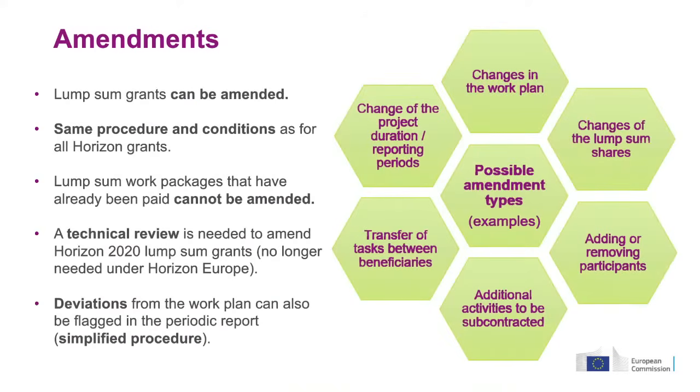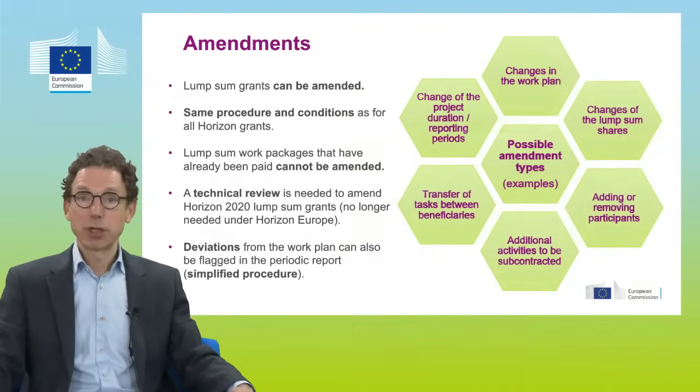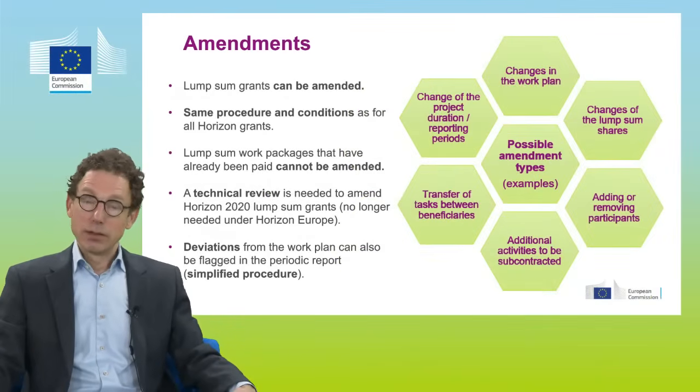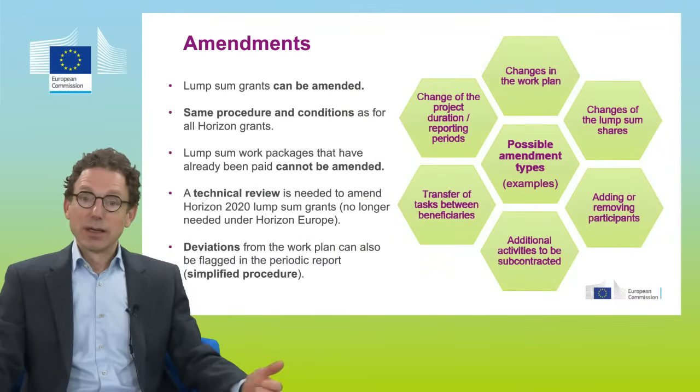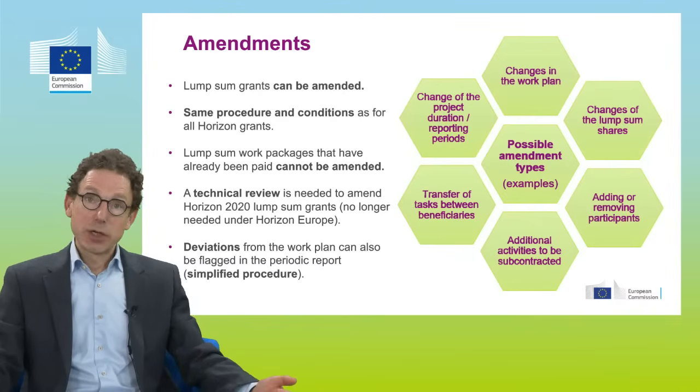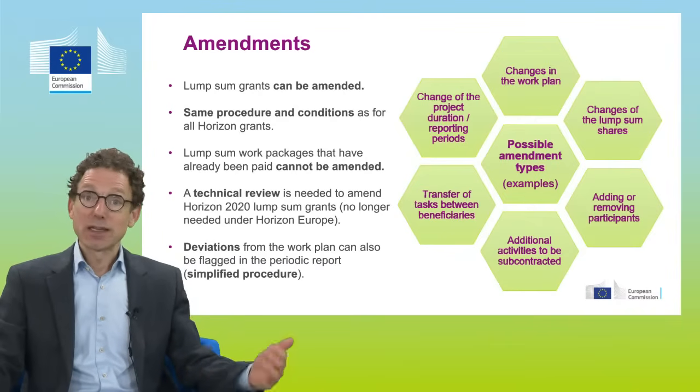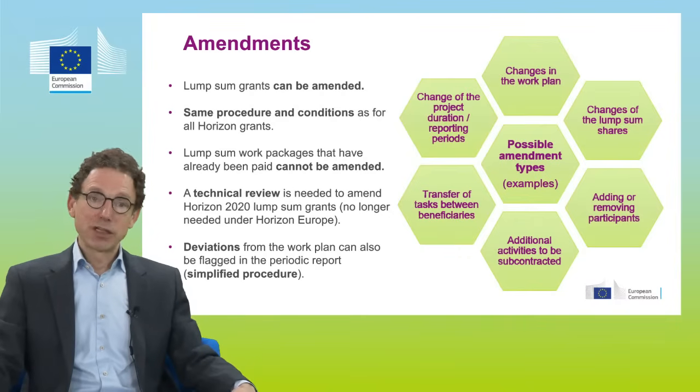Now, amendments. To avoid any misunderstanding, they can be amended in exactly the same way as all other grants that we have. We have exactly the same procedure and conditions. An amendment cannot change the project substantially. It cannot call into question the award decision. One could also translate that as: the changes that you make should not have led to rejecting the project at evaluation stage, even though that might seem a little bit of a theoretical concept.